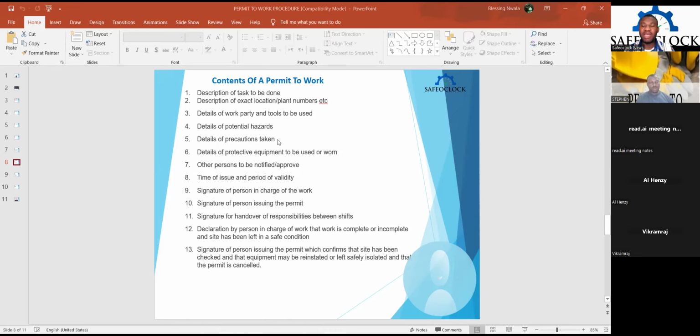There are some situations where people can extend permits. Some permits can be extended for a few hours. In some cases, the workers might need to work extra hours, maybe one or two extra hours. That will be extended by both the permit issuer and the permit coordinator to ensure there is proper communication and to notify everybody that such activity is being extended and is ongoing at that time.